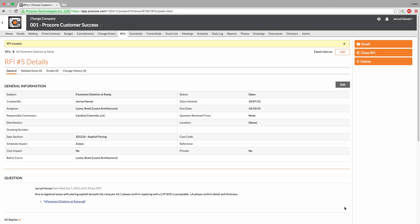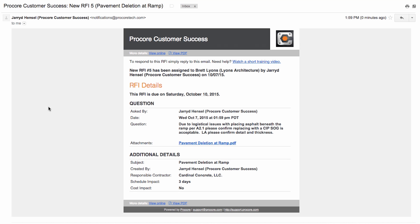Now let's take a look at the new RFI email the assignee and distribution members received. There are three ways to respond to a Procore RFI. First, a user can click the View Online link and respond to the RFI directly in Procore. Second, a user can respond to the RFI on Procore's iOS or Android mobile applications. And third, the easiest way to respond is to simply reply to this email with the answer, just as you would with any other email.